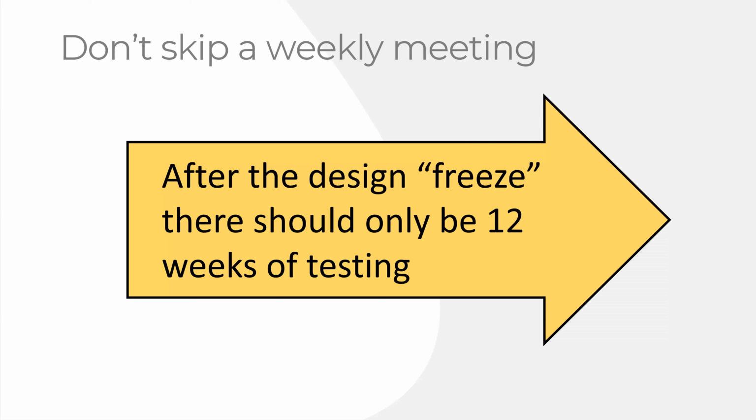You don't want to skip those meetings because now you only have 12 weeks before you're going to submit your 510K. The EMC testing is 4 weeks. Electrical safety is 8 weeks. That's 12 weeks. Biocompatibility could be 10 to 12 weeks. Sterilization validation could be a little bit longer than 12 weeks, but all these are roughly about 12 weeks in length. So we have 12 sections that we have to prepare in addition to the testing section.